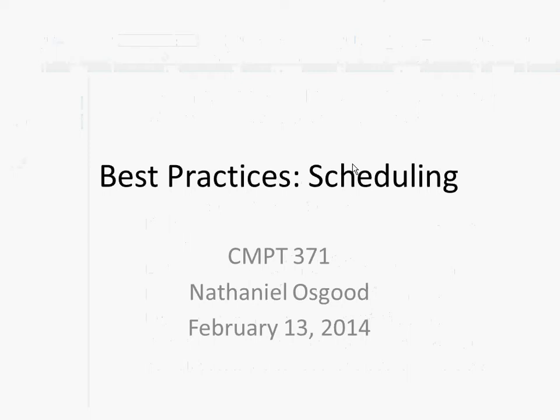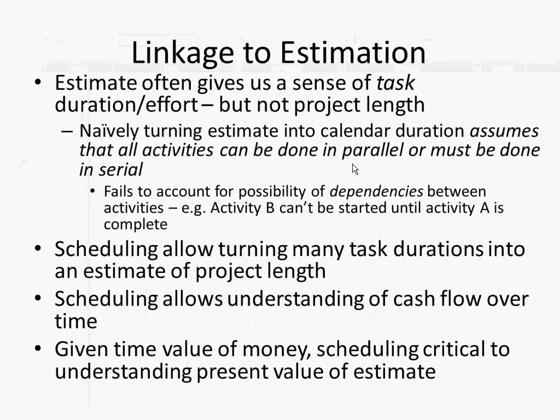Of all the activities, there may be certain activities you have so-called slack on. You have leeway on. You have float on. We express it in different ways. Some activities, you don't have to keep on the ball about them. Critical path, you need to keep on the ball about, because if it slips, it's going to delay the overall project, when the overall project completes. If you can identify that critical path, it'll let you focus your efforts. It'll let you know what things we need to keep our nose to the grindstone on, and what things we can move people from because they're not as critical.